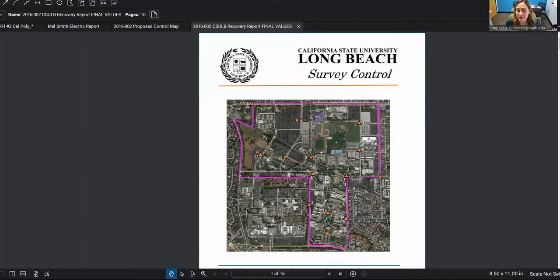And just to kind of add to that, on more recent projects where we've already had the GIS established, now we try to account for the cost to update the GIS early on in the project budget. So for larger major capital projects, at the end of the project, ideally there is the funding available to update the GIS with that major capital project.